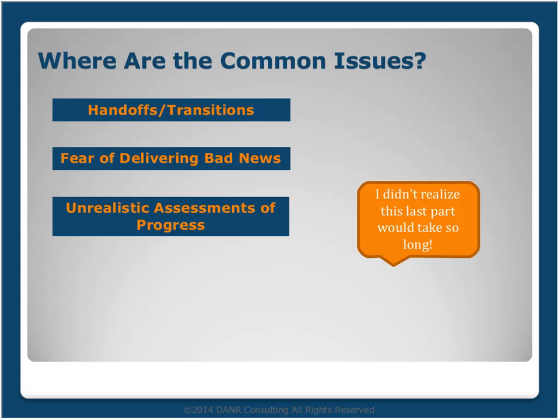So this is where the project manager needs to take a trust but verify philosophy. What I mean by that is that when you ask for a progress report, don't settle for the "tell me," but ask or insist on the "show me." So you really want to be finding ways to validate that someone's reported progress is what they say it is. And I know I'm not the only project manager that's been told someone was 80% complete with the task, and 2 weeks later, and another 80 hours worth of charges, he or she is still 80% complete with the task. So, that's a reality that we deal with.